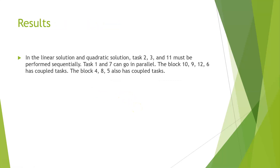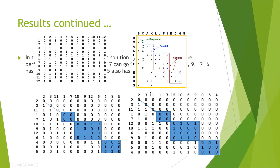For our results, in both the linear and quadratic solutions, tasks 2, 3, and 11 must be performed sequentially, tasks 1 and 7 can go in parallel, the block 10, 9, 12, 6 has coupled tasks, and the block 4, 8, 5 also has coupled tasks.